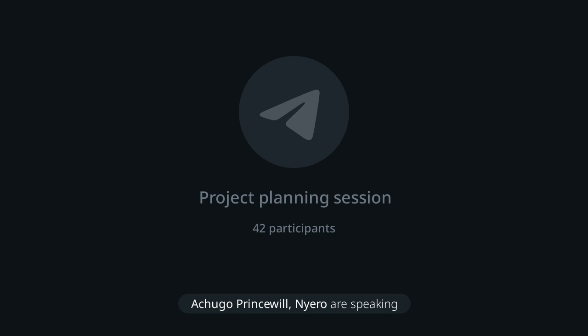That's why I said a sprint can be shorter than 2 weeks, but the expectation normally is 2 weeks to a month. So if everything that is on the backlog for that particular 2 week sprint, remember there's a sprint backlog, has been finished before the 2 weeks, everybody cannot just sit down. The sprint can now end, and they will now start planning for the next sprint. They'll do a sprint review and then plan for the next sprint. So that means now, back to your question.